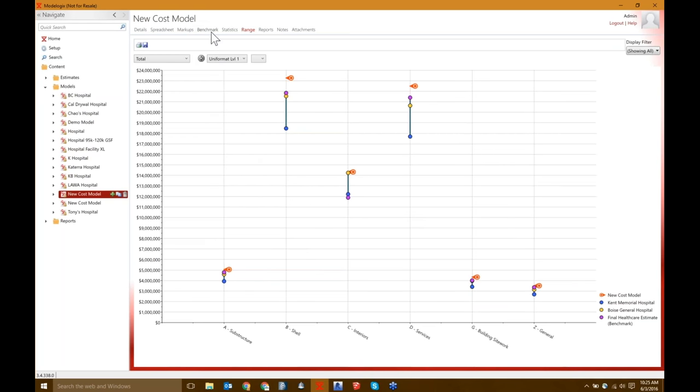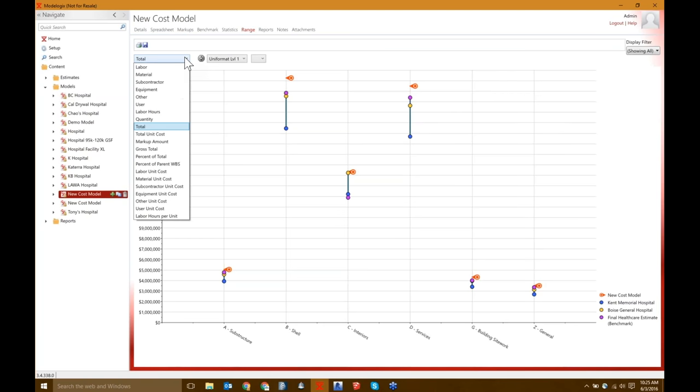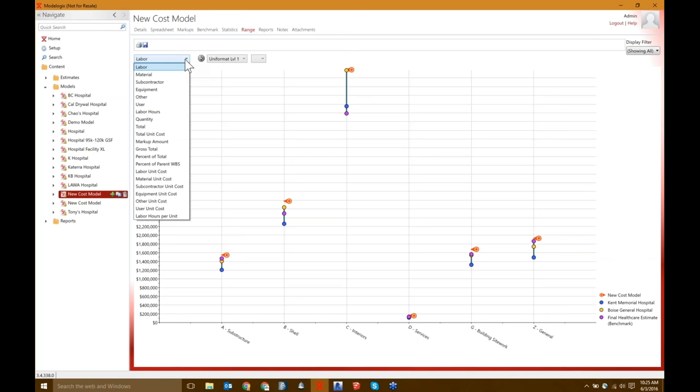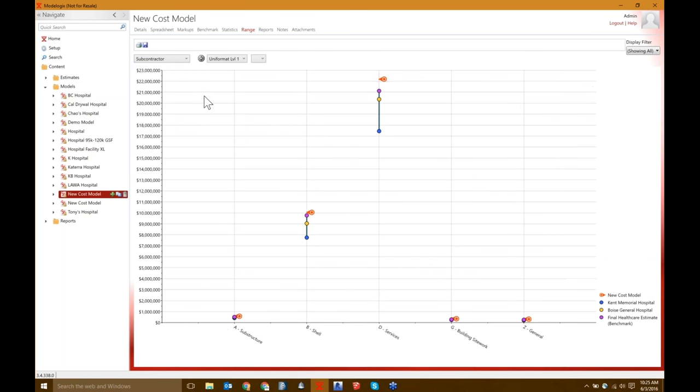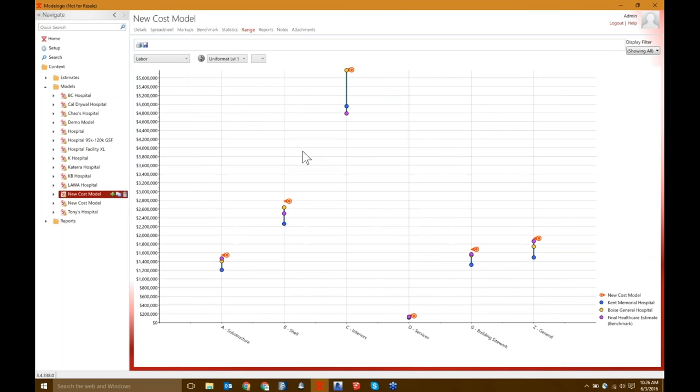So we have a project that's down 11 million and we have a project up here in 14 million. So what this can prompt our pre-con managers and estimators to do is analyze these projects a little deeper, understand what's driving these costs. And we can even jump in a little deeper to kind of see what is it about the project that's really driving the costs here. And we can see rough carpentry here is another pretty wide range. Elevators as well is another wide range. And we can also do the same slicing and dicing of the data as we did in the spreadsheet view. So now we're looking at it in a uniform format, and we can see that the shell and the services are our top dollar, our driving forces in our money. And also see that the risk is higher there.